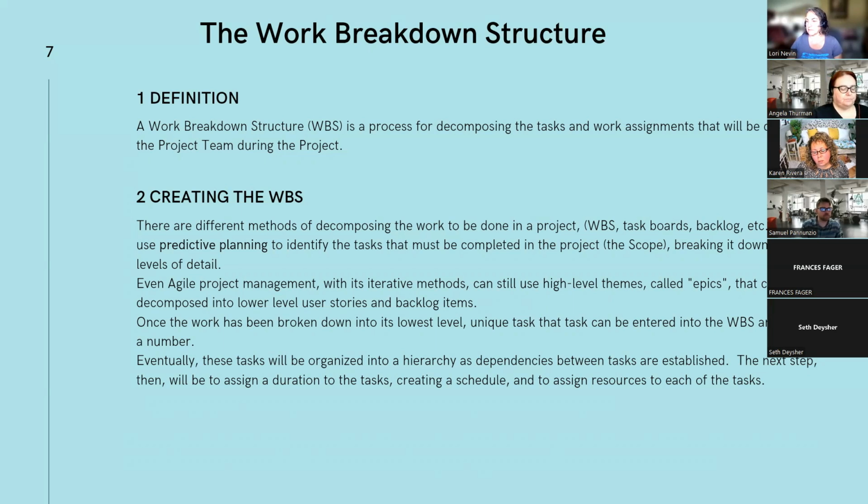And then you identify any dependencies between the tasks, and once you've got the WBS created, you begin to assign durations to those tasks, and that's how you create the schedule.